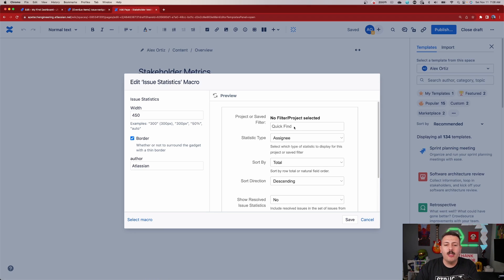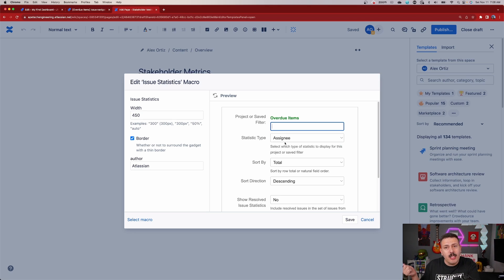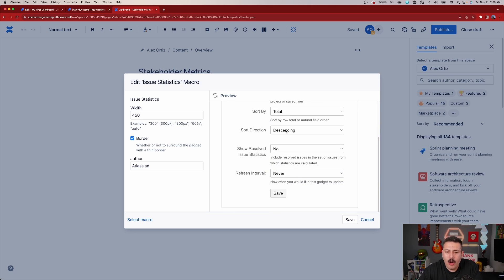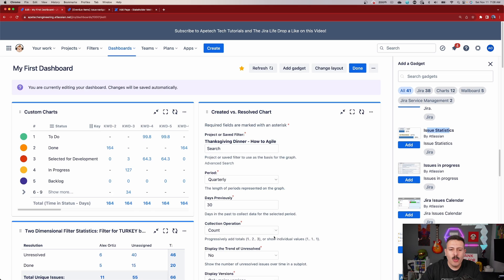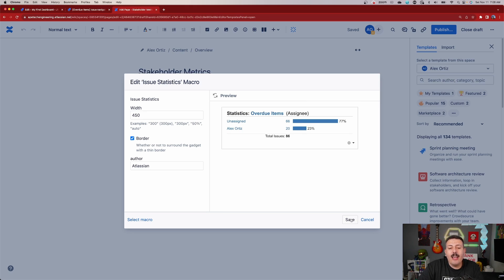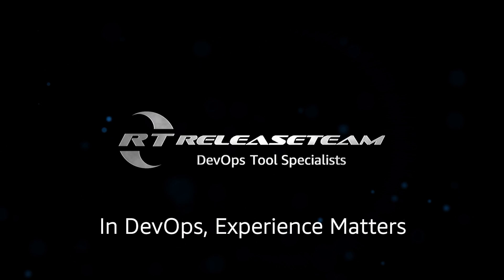Once you have your gadget selected and click Insert, it operates just like the Jira gadget but within the Confluence UI. Enter your filter — I'll do 'overdue items' — and these will behave exactly the same way. If you struggled with the dashboard in Jira you'll struggle here too, but if you set yourself up for success in Jira you'll be set up for success here. Pick your statistic type — I'll use 'Assignee' to see who's responsible for being late — then hit Save. It's a double save: save the preview, then save the macro itself. And there it is, inside of Confluence.